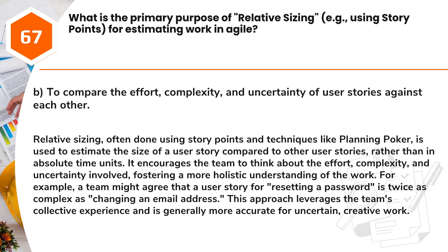Answer: B. To compare the effort, complexity, and uncertainty of user stories against each other. Relative sizing, often done using story points and techniques like planning poker, is used to estimate the size of a user story compared to other user stories, rather than in absolute time units.